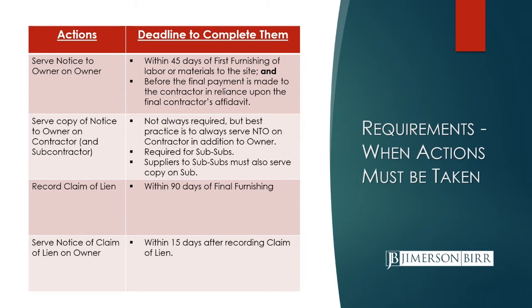When you find yourself unpaid and it's time to record your claim of lien, you have to do it within 90 days of final furnishing. Final furnishing is a hotly debated term. In some cases, it's the last day you did new work or the last day you provided new materials. If you don't record your lien within that 90 days, you're out of luck. You no longer have lien rights.